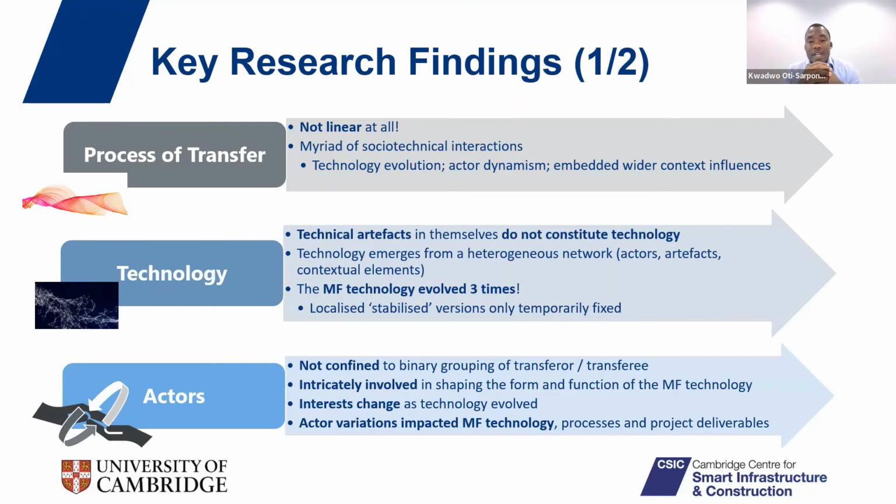The third wave of change had to do with fixing some panels in the monolithic formwork technology. Some parts led to bulging outer leaves of the buildings because they were buckling. They were not stiffened enough, and so were buckling under the weight of wet concrete. These had to be redesigned, and their connections had to be redesigned midway in the project.